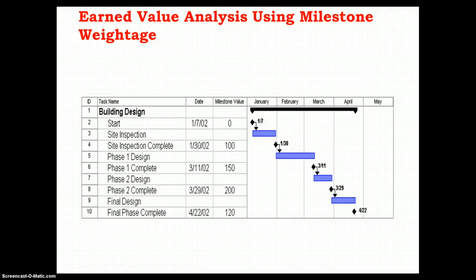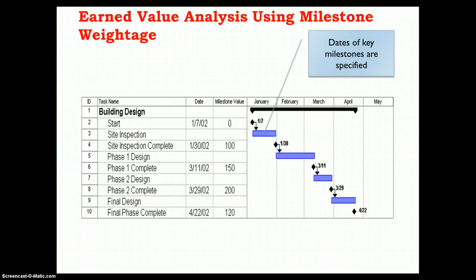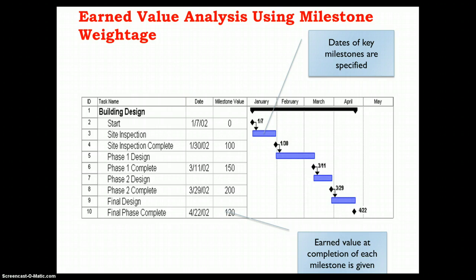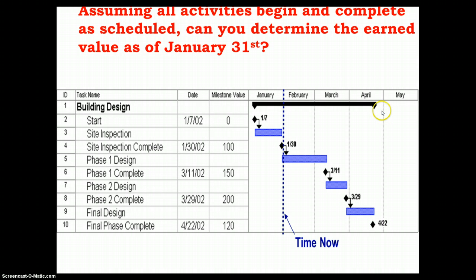Here is an example to understand earned value analysis using the milestone method. The dates of key milestones are specified, indicated by diamonds on the schedule. The first milestone is the start of the project, the second is site inspection completion on January 30th, phase 1 completion on November 3rd, and phase 2 completion by March 29th. The earned value at completion of each milestone is shown in the corresponding column. The first activity has no earned value, the second has $100,000, and phase 1 completion has an earned value of $150,000.